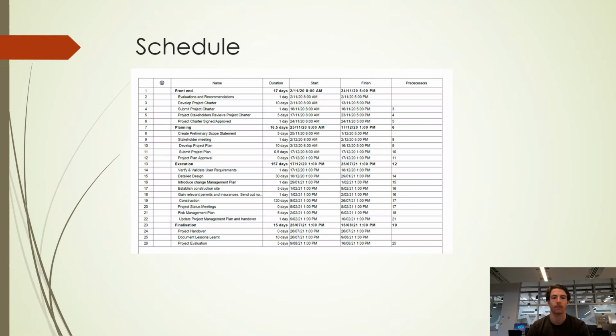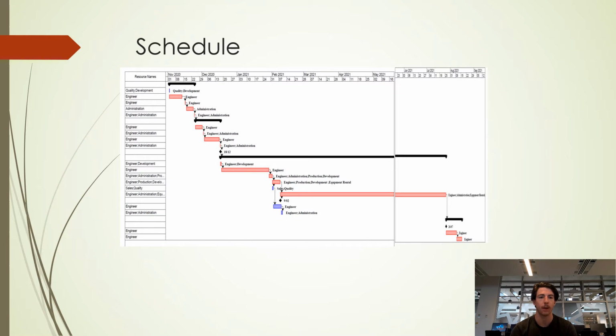The schedule for the Smartlane project was created in Project Libre as shown on the screen. Task durations and predecessors were added. Resources were added next, which can be seen on the screen next to the tasks. Many assumptions were made, such as the duration of the task, the resources associated, and the resources availability. Risk can be reduced by adding extra time to the end of each task.